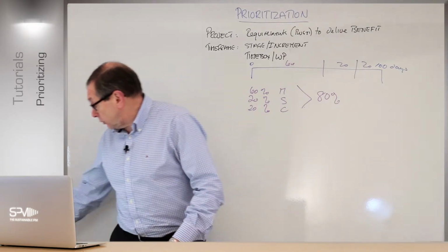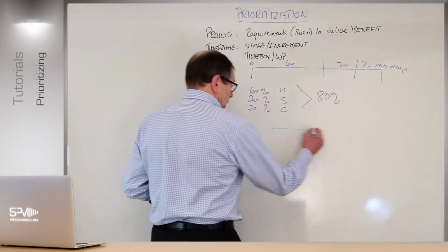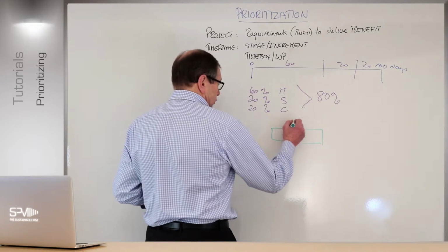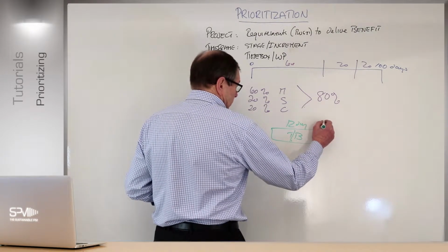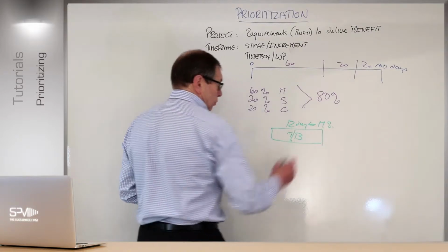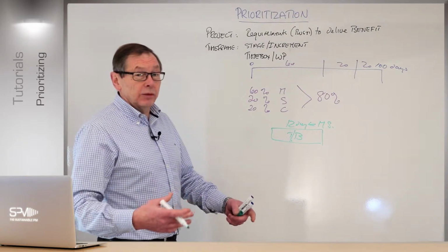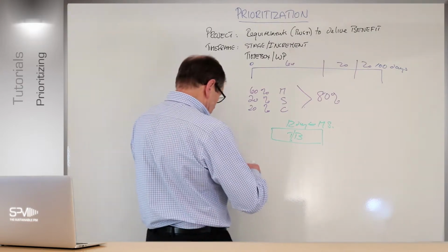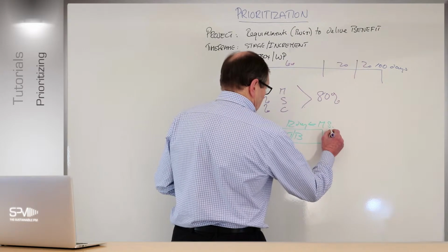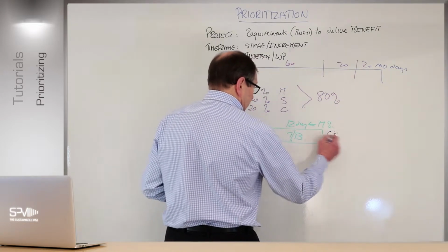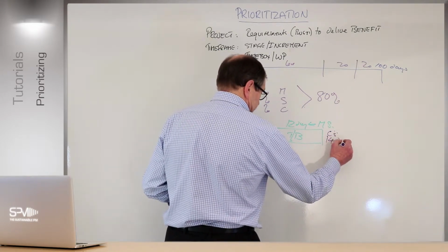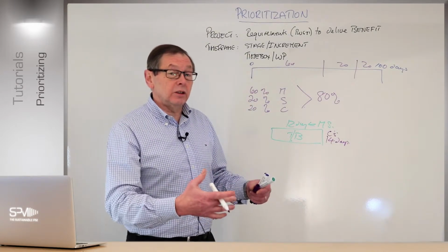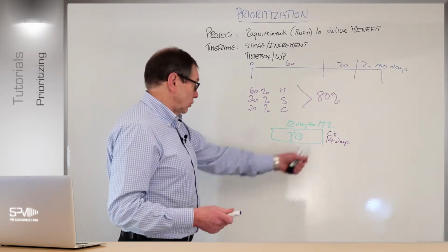So just very quickly to explain that, right? If I've got my time box here, at the moment, that time box is say 12 days, and I've got a mixture of musts and shoulds that equal that 12 days, but that doesn't give me enough contingency because we're not really sure, especially at the beginning of the project, then I can actually put in a couple of coulds in there, right, to make that 14 days. Right. Remember, we're still in design, so we can still design around what I actually need to make the time box work. So bear that in mind too, right?